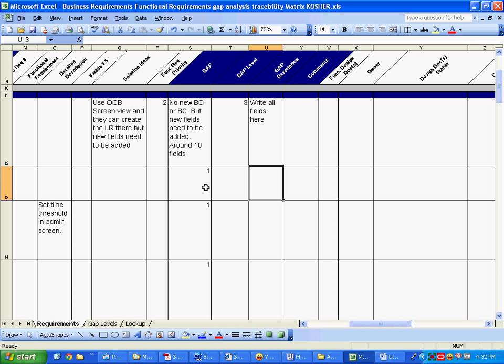Whatever you had in the BR, your BR requirement document must be having your FDD, some elements there, right? Everything there is needed to make these fields here. Some people say we'll do it after development, but this is to prepare for the development, so that we know how much money we need for development. So this is much before development. Always remember, it's going to include analysis, development, and testing time, especially analysis and development, maybe not testing.